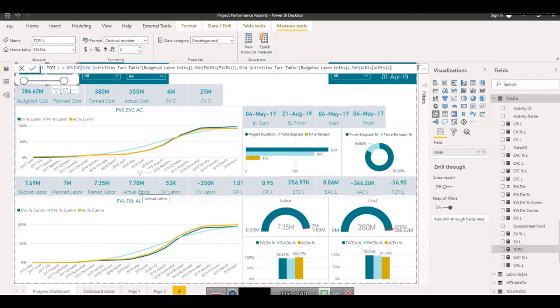So what actually happens is, let's say I am standing almost at the end of the project. Once you are at the end of the project or near the end of the project, you must revise your budget, because you foresee that the budget control is not going to happen. We need to revise, we need to re-estimate. So then your formula will become the estimated completion minus actual, because you see here the estimated completion is saying you are going to spend more than your budget. Budget was this, you have spent a lot of actual more than the earned, so most likely your estimated completion will be more.